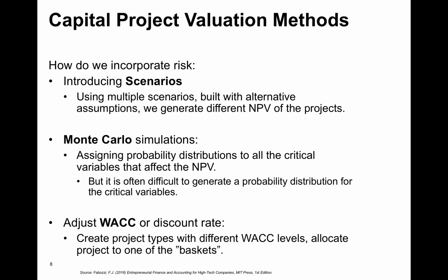A different approach is the Monte Carlo simulations. With Monte Carlo simulations, the thought here is that you assign probabilities to those distributions. And then what you are actually trying to calculate is how likely it is that, with this combination of probabilities, what is the impact that it would have on your net present value. And this allows us to think ahead on the possible scenarios that we will be exposing ourselves to in a more structured, randomized way. So basically what we would try to know here is, okay, I know the probability distributions, but maybe I don't know the future outcomes of what will happen. But this will help me to understand what my company might be getting exposed to.